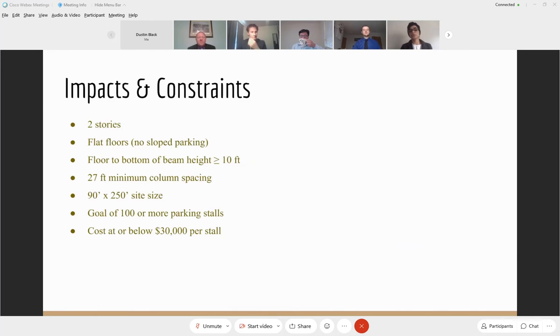Impacts and constraints: we are required to design two stories of parking garage with flat floor and the height of floor to the bottom of the beam should be greater than or equal to 10 feet. Minimum column spacing 27 feet. The size of site we are given is 90 by 250 feet. Our goal is to design 100 or more parking stalls. The cost should be at or below $30,000 per stall, and these constraints allow for adaptive reuse of the building.